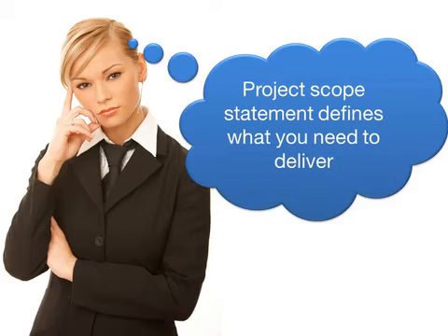And even though it is not officially mentioned as an input by the PMBOK guide, you should nevertheless consider your scope as well. In particular, the project scope statement that tells you what you need to deliver. If we are, for instance, a projectized company and we do similar projects again and again, then going through our scope statement allows us to identify risks. The quantitative prioritization of a risk may differ on a standard project that we have done several times before than if we had to perform a project that has never been done before by our company.